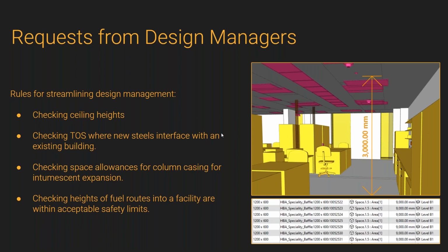What I was able to do was, whilst we were in that meeting, just do a quick takeoff, again, of just elevations of ceilings, and that way we were able to pinpoint which ceilings were incorrect very quickly. So that's just saving a little bit of coordination time. But if you take that time saved and you spread it across everyone who needs to be involved in that coordination process, it can be quite the amount of time saved.